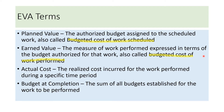There are several key terms to understand. The first is Planned Value (PV) — the authorized budget assigned to the scheduled work, also called Budgeted Cost of Work Scheduled. For example, in a $10 million ERP implementation project to be completed in two years, you spend $5 million in year one and $5 million in year two. So the planned value of this ERP implementation is $10 million.